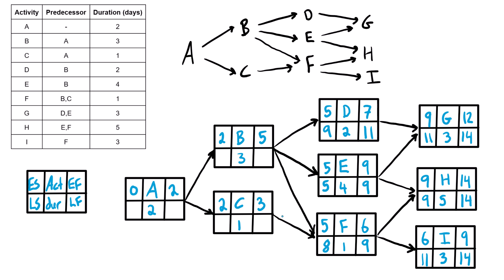Activity C has only one successor, so we bring that number straight across and subtract the duration to get a late start of seven. Activity B has three successors with three competing values: nine, five, and eight — we take the smallest, which is five. Five minus three gives a late start of two for B. For activity A, there are two successors; we take the smallest of two or seven — we bring two — and two minus two equals zero.